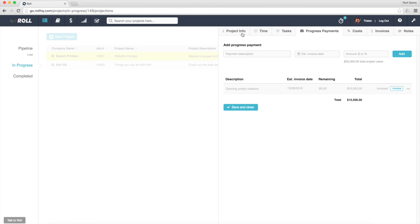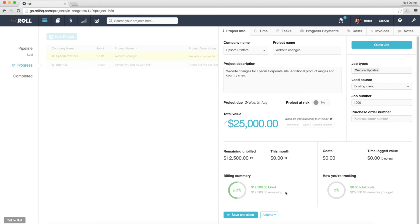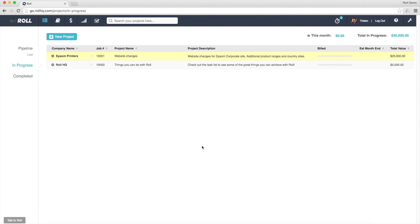Now if I go back into my Project Info screen, I can see the total value of the job's $25,000, and I can see that $12,500 of that has been billed already, which is fantastic. So I've now imported the Opening Balance on the job. Now if I save and close on that,